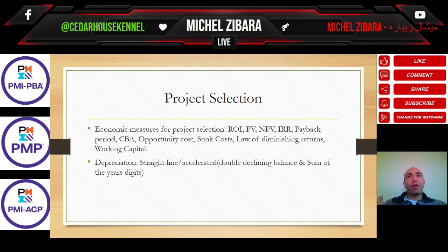If I start adding 5 and 6 and 7 and 8 resources, that's an overkill where it will no longer expedite finishing the work activity, and it will be the same with 10 resources executing that work activity. It would be the same as 5 resources. So it's a point where when we start adding, we are no longer getting the productivity, and that is called the law of diminishing returns. Working capital is the investment to start the project.